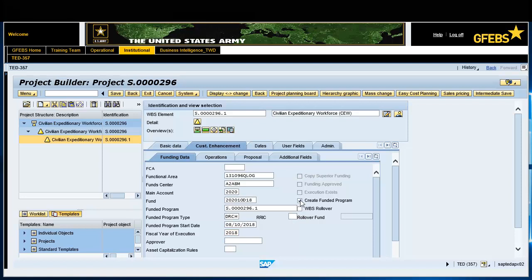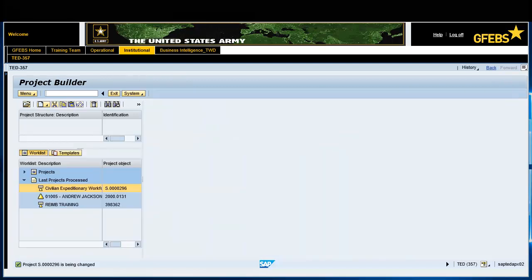Click Save on the menu bar and record the project definition number for future reference. Note: the informational message at the bottom left corner informs you that the project has been changed. You can verify by double-clicking on the project and viewing the Basic Data tab section. The system status will indicate CRTD.